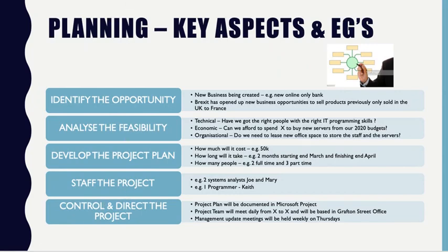When the feasibility study is complete, it's the responsibility of senior management to consider whether the project should be selected for implementation. Generally, organisations have a portfolio of projects which will vary in size, risk, purpose, duration, and value to the business. Management will consider any new project proposal in the context of any currently running projects and whether the new project system idea fits in with the strategic objectives of the organisation. Once a project has secured approval and funding, then the planning phase can begin.